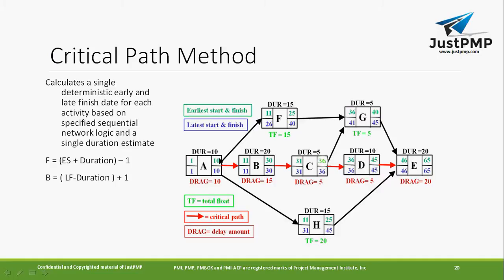That is the first day. What is the duration it took? It is going to take 10 days to complete activity A. So on the 10th day it will get completed, right? So that is the earliest start date, and the earliest finish date is the earliest it can finish this task. That's called the 10th day it will get completed.